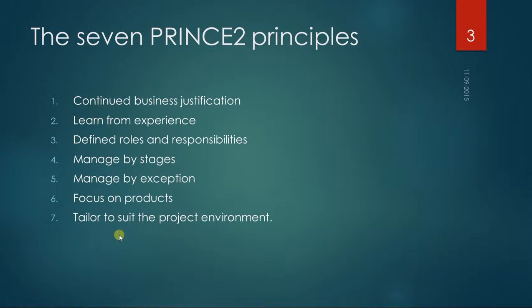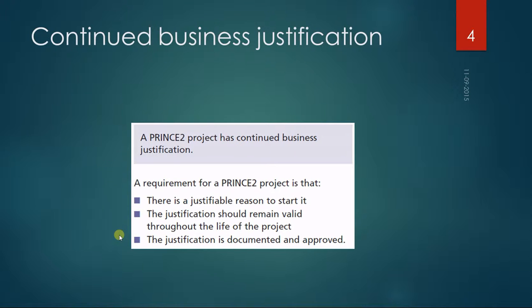I'm going to jump right into the business case here. Prince2 is really focusing on business case. If you don't have a good business case, you should close the project. That's really simple. And each time you pass through a phase in the project, the project manager must ensure that the business case is updated, and the project board will check that it is updated.